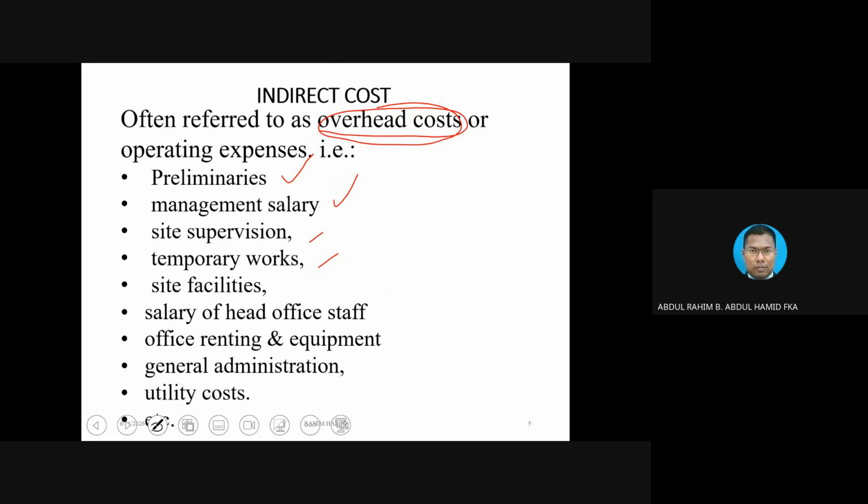The contractor's survival basically depends on projects. If, for instance, the contractor does not have any project in a particular year, the contractor has to use their own savings to finance whatever costs there are at the headquarters. It could be rent, utilities, and all kinds of salary payment. But if there are projects, a certain portion will come from the project.